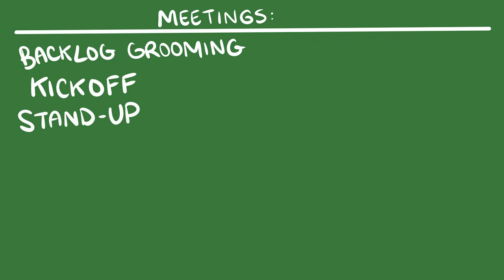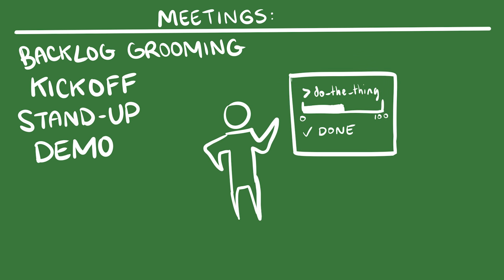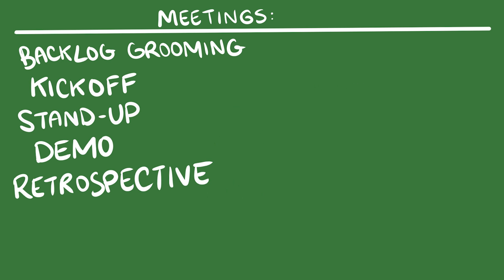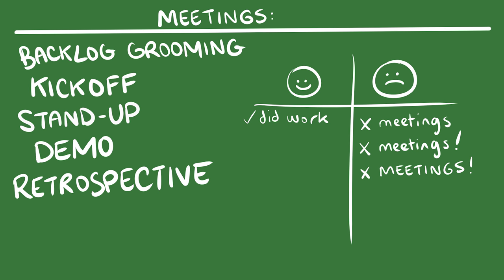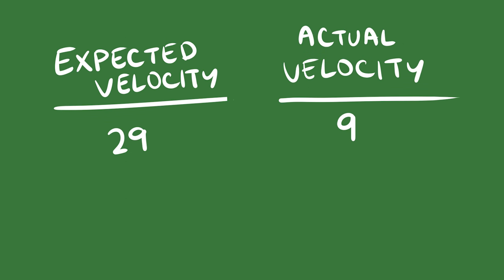On the last day of your sprint, it's time for your developers to demo their completed features to the product owner and the rest of the team. Finally, to end the sprint is the retrospective. The team talks about things that went well and things that went poorly. If the team delivered all of the stories that they committed to, now would be a good time to eat the delicious donuts of celebration. If the team did not deliver all the stories they committed to, instead you should eat the less delicious bagels of shame. How many points did you actually complete? As you finish more and more sprints, you'll get a feel for your actual expected velocity, which will be a useful tool going forward.